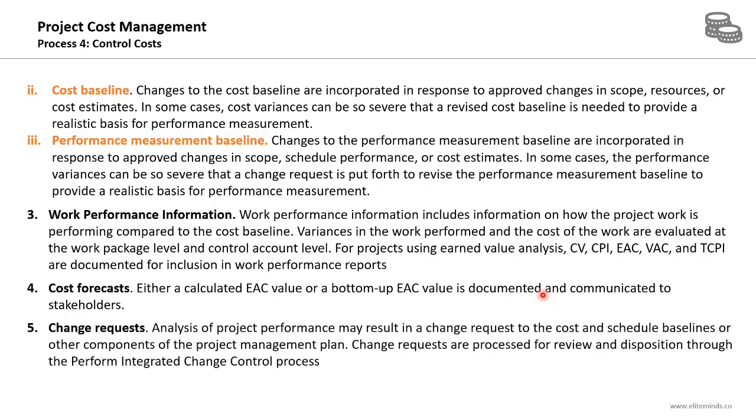The last output will be change requests. The majority of the monitoring and controlling processes will produce change requests as outputs. Analysis of project performance may result in a change request to the cost and schedule baselines or other components of the project management plan.